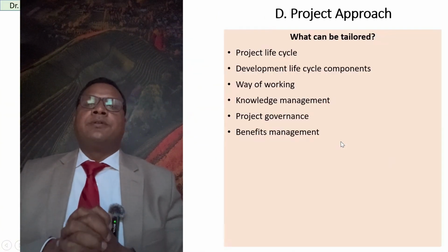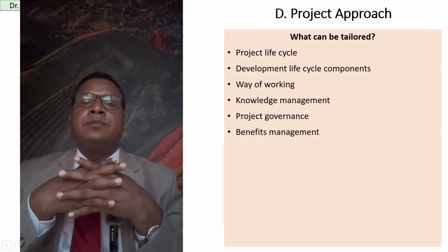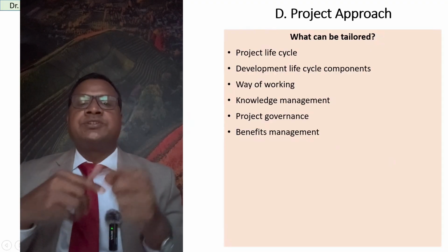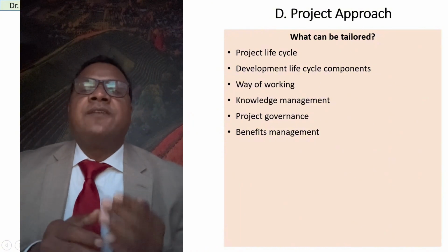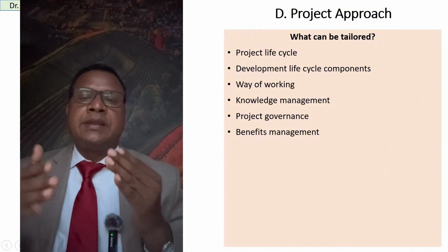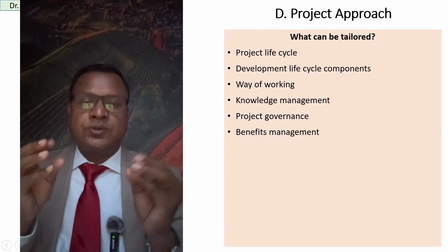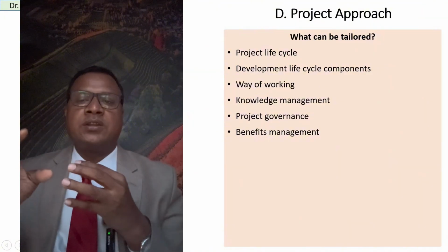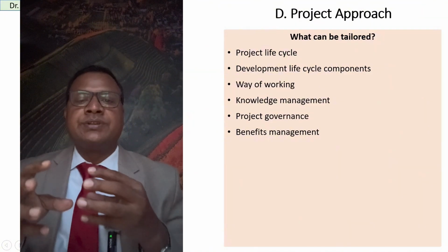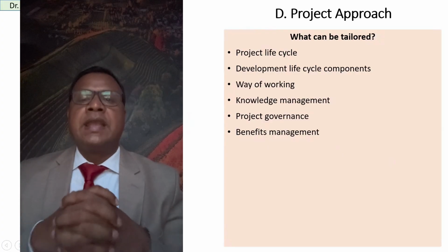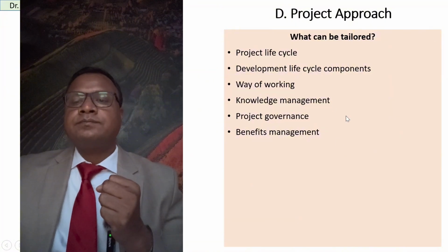So what can be tailored? If you want to tailor a mixed approach, or based on necessity, you actually change your product. In this case, first, the life cycle can be tailored. It can be predictive, change driven, or mixed. Development life cycle components can be tailored. Ways of working, the process, can be tailored. Knowledge management can be tailored. Project governance, how it will be governed, can be tailored. And benefits management also can be tailored. And finally,